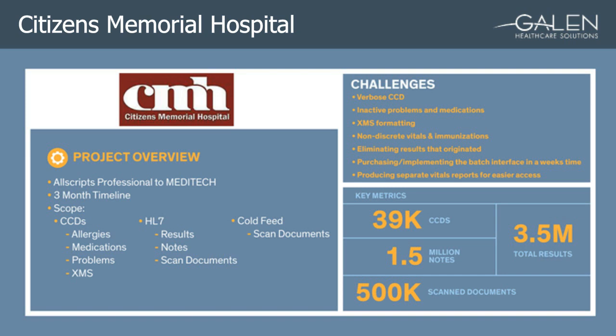We didn't have an inbound ADT feed, so we ended up scripting those 20% of the patients that didn't exist into our system, and basically this was ambulatory to ambulatory for conversion. Once we had all of the patients in our system, then we looked at what data we needed to bring over.